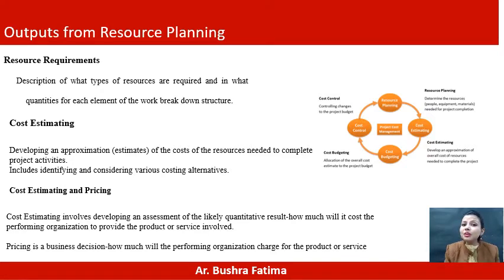Top-down typically works when past costing data are available. In this, project managers usually have experience executing similar projects and can therefore take a good call. And bottom-up works for projects in which the organization does not have a lot of experience, and therefore it makes sense to calculate a cost estimate at a task level and then roll it up to the top. So this is the resource planning.